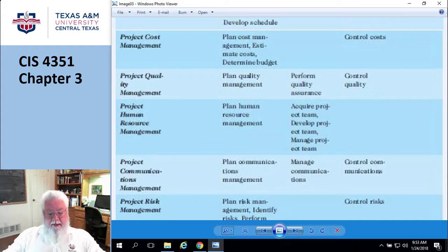Okay, cool. So, common tasks that occur at this part are determining the scope, time, and cost constraints. Remember the little triad, the little triangle thing? Trying to come up with those to find out if this is even a viable project. You really need to know what the cost constraints and the time constraints are. For example, you say, okay, we're going to work on this project, it's going to take us 6 years to do. And everybody goes, 6 years? No way. That one goes to the bottom of the list. We're going to pick out these short wins.